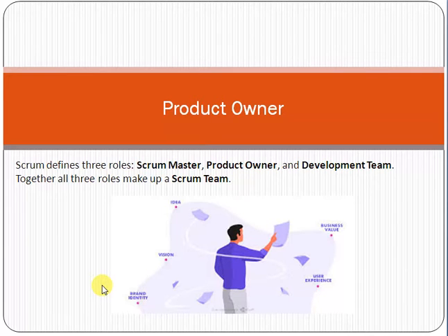Let me give you an example here. First of all, try to focus and grasp the concept of Scrum. Suppose you are implementing an e-commerce solution for a customer and you have to deliver 40 tasks. If you use the waterfall approach, you plan, develop, test, and then deliver it to the customer. Now in the Scrum framework, we use the sprint approach. A sprint is a time box of 3 to 4 weeks, in which we can take 10 tasks from the product backlog. The product backlog is all the overall requirements.